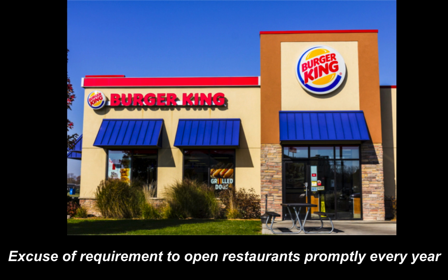After the deadline for opening all 10 restaurants had passed, Burger King warned Family Dining that it was in default. Family Dining opened the last 2 restaurants anyway, despite Burger King's insistence their agreement was terminated. Burger King sued to stop Family Dining from using the Burger King trademarks at this restaurant, which would have been debilitating to the business, and asked the court for a declaratory judgment that the contract was no longer in effect.